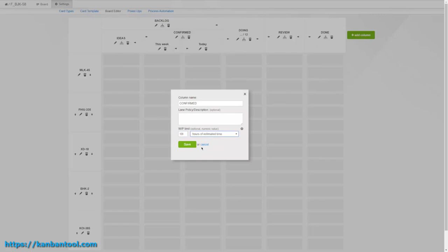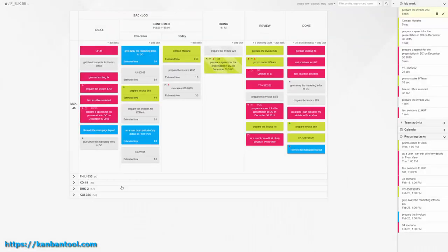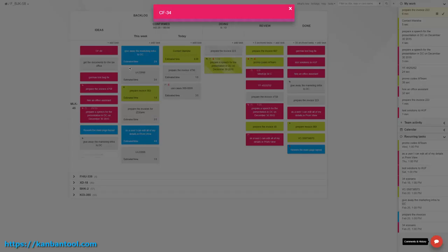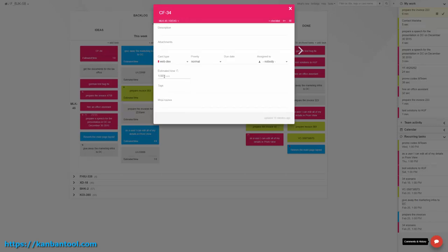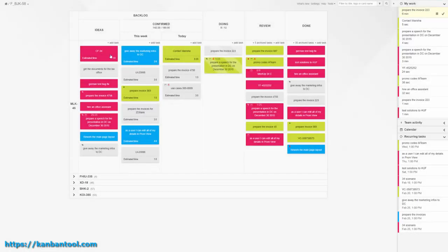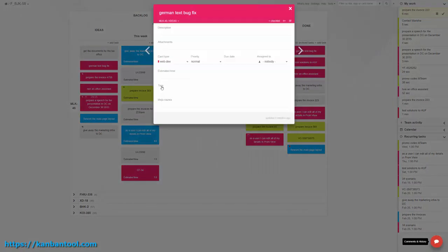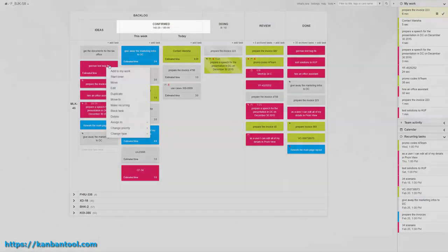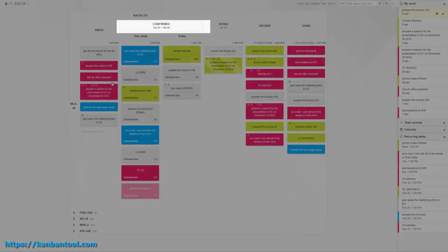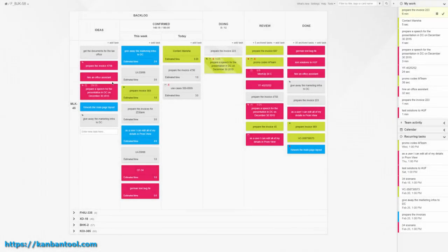Now, after planned work reaches the maximum weekly capacity, any other items would be added with the awareness of them fitting outside the week's limit. And in order to easily point the team to which tasks need doing first, use the Kanban default approach with which top most items are to be pulled first. You may also use built-in priorities or task colors to signify importance.